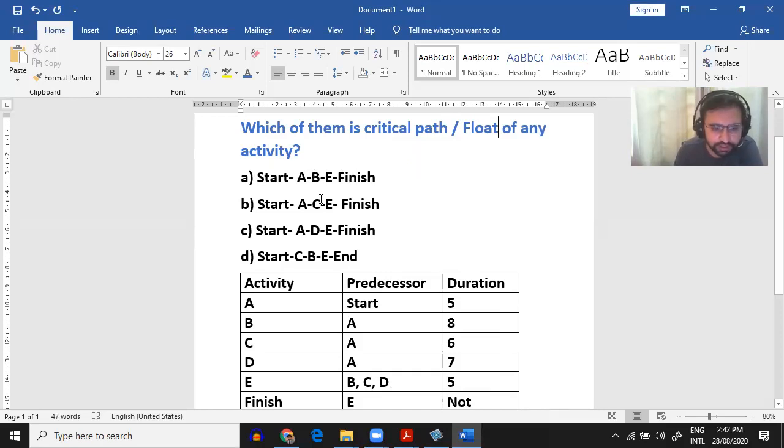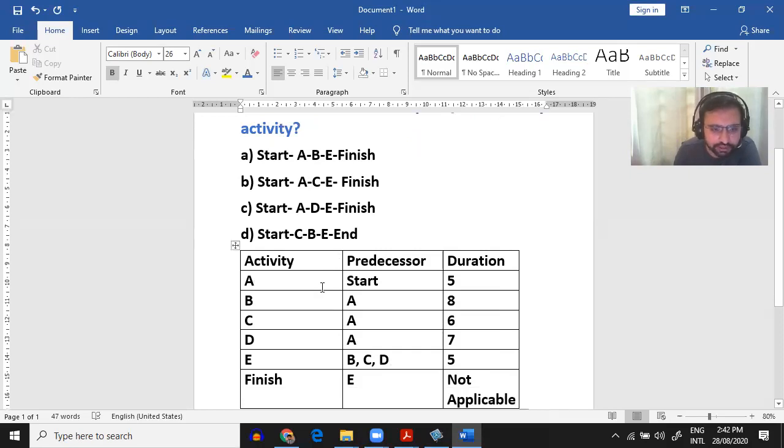A-B-E, A-C-E, A-D-E. And this is the basically table. Activities are starting from A. Then B, C, D have a predecessor as A, A, A. Then all three activities are going to E, and E is going to finish. So we have duration 5, 8, 6, 7, 5. And let's see how we can make a whiteboard for it.